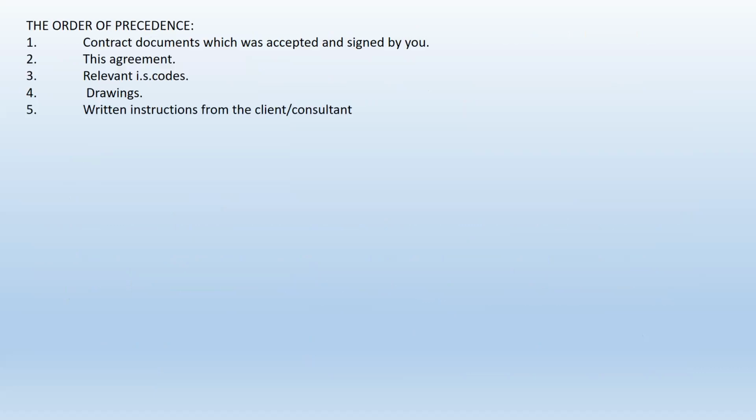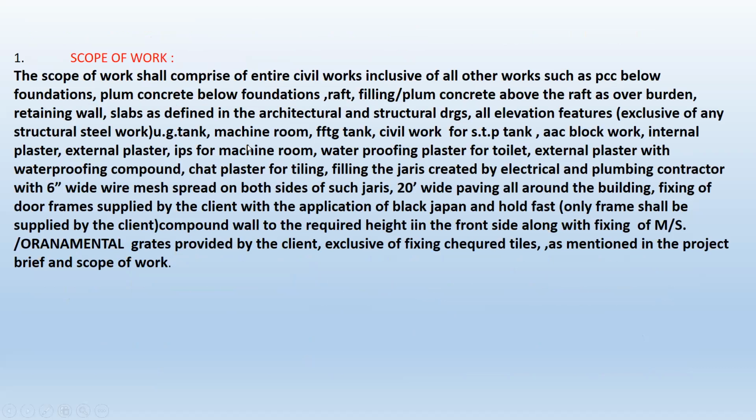The order of precedence has to be defined. It is supposed to be the contract documents signed by the contractors, the agreements, the relevant codes, the drawings, and finally the written instruction from the client and the consultant.